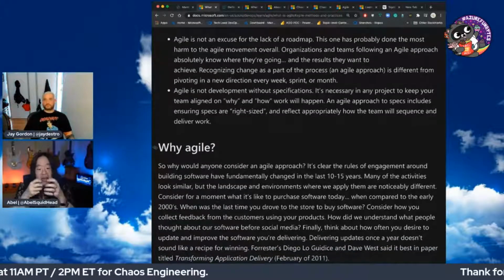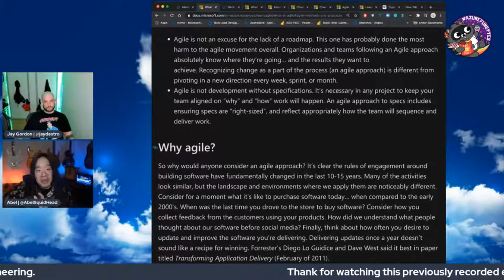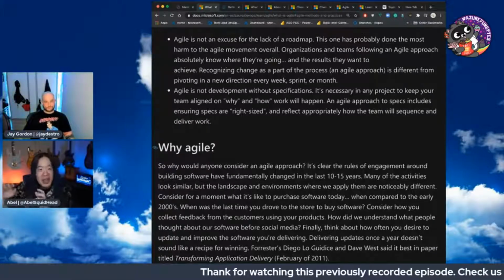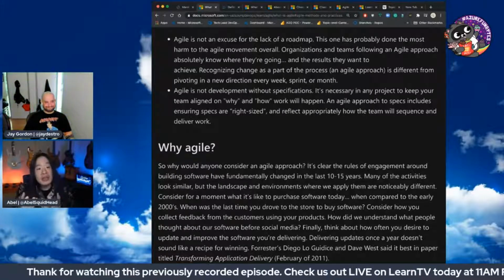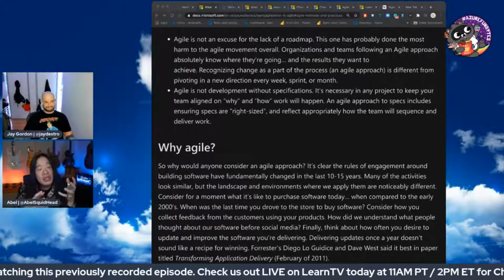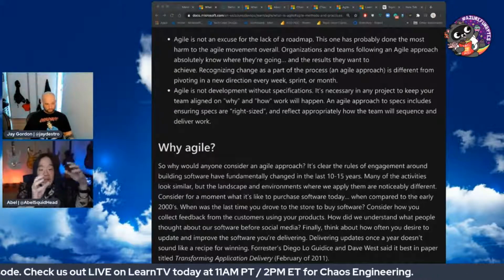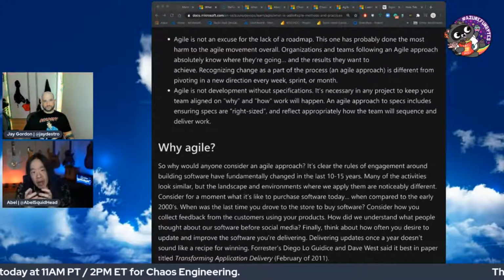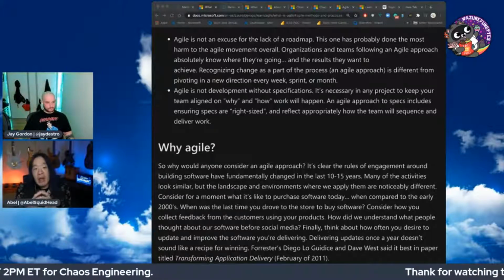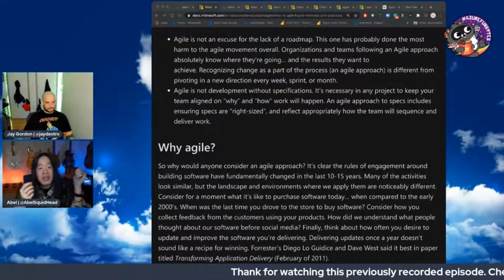They work on it. They're done with it. At the end of their sprint, hopefully they'll deploy to production, but that starts going into DevOps. We'll touch on that later. But at the end, they should demonstrate this to the product owner and say, look, you wanted these 3 user stories or backlog items or whatever you want to call them. You said they're the most important. We got them done. Look what we did. And the product owner can then look at it and be like, oh, that is exactly what I wanted. Hooray for that. Then he reprioritizes that backlog, right?